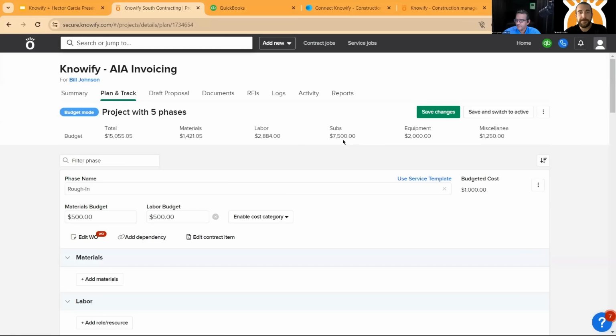We're simply just figuring out, hey, my client wants me to do an expansion to their living room. Okay, we scoped out the job. This is what it would cost me. So you start fundamentally with how much it would cost you. So then you can plan for how much you're going to charge and how much profit and markup you want to add to that. Exactly.